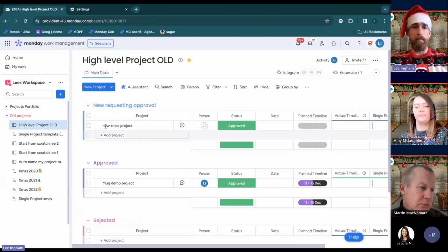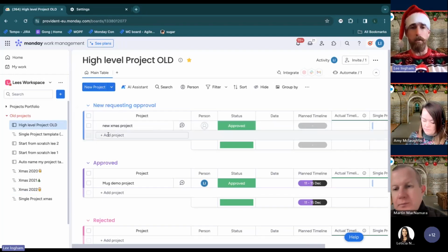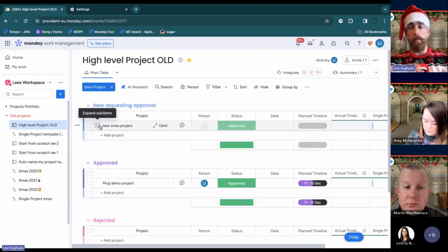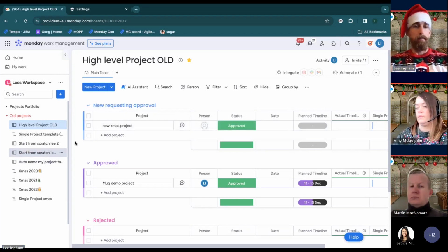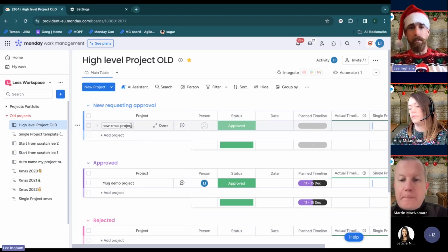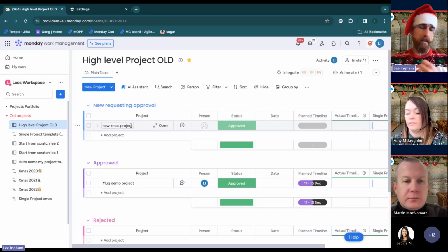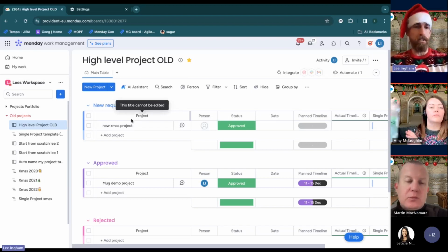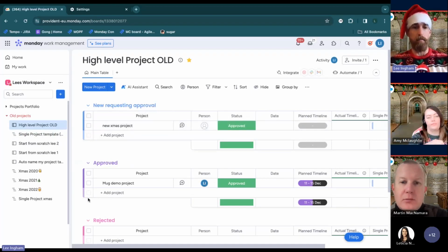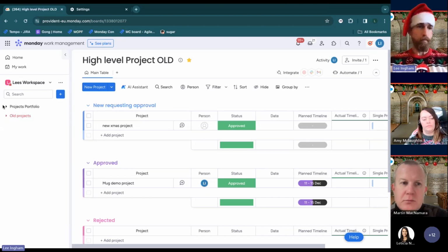Okay, we can't do this by automation. So we have to either use make.com to do that connectivity, or something called roll up multiple boards, which is another good solution. But if we don't have the funding to add more add-ons to the system, somebody's going to have to go down, the PMO or whoever's managing the board, select everything and then tick it back up. So that's the key problem, or the pain point that we've had over the years.